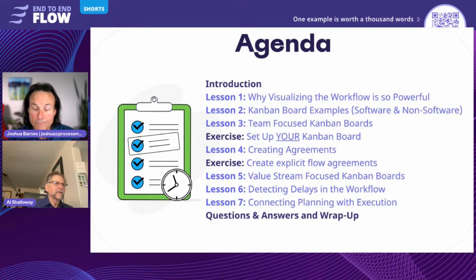You probably even heard of cost of delay, which Don Reinertson talks about. Consider this: let's say I have 10 units of value I'm going to deliver after 10 months, versus maybe I can get 1 unit every month. If I get value sooner, then the cost of delay is, what did I lose by getting it later? And that's good. In fact, that's the one thing he says you should measure.